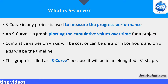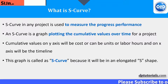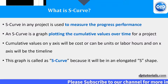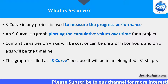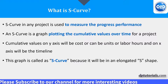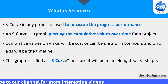The S-curve is a tool to measure progress performance. An S-curve is a line graph plotting cumulative values against the timeline. Cumulative values on the Y-axis can be either cost, units, or man hours, and the X-axis will always be the timeline.